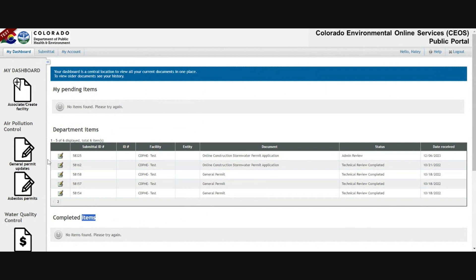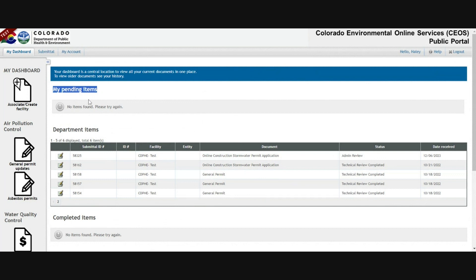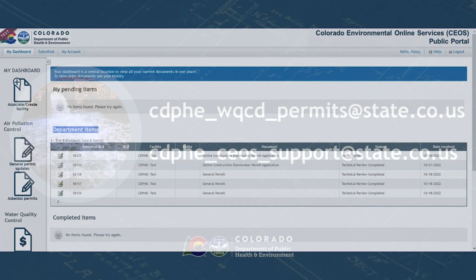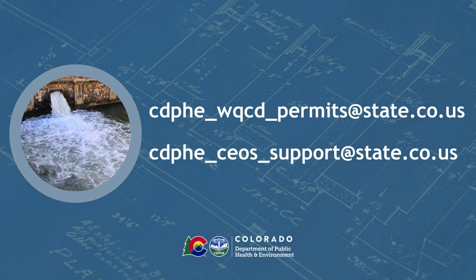If anything is wrong with the renewal application, the permit team will send it back to you, in which case it'll be moved back to the my pending items list and be highlighted in red, where you can edit and then resubmit. It will move back to the department items list. If you have any questions, please send them to either one of the following email addresses. Thank you.